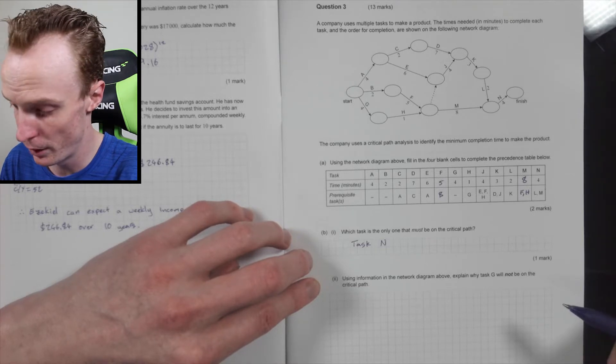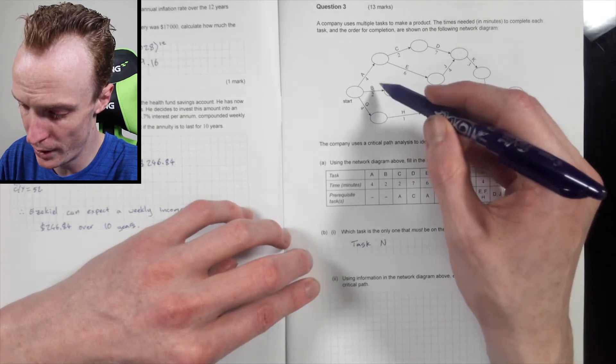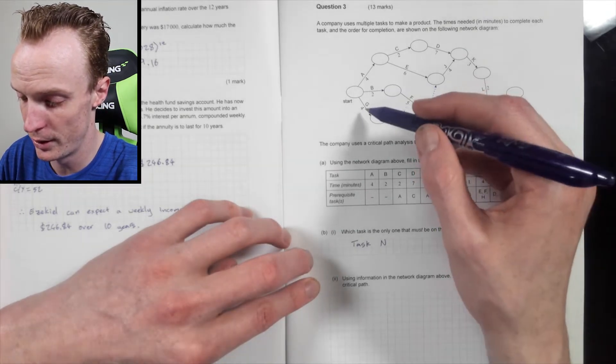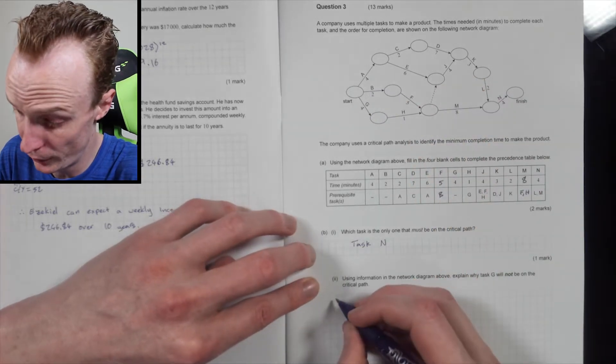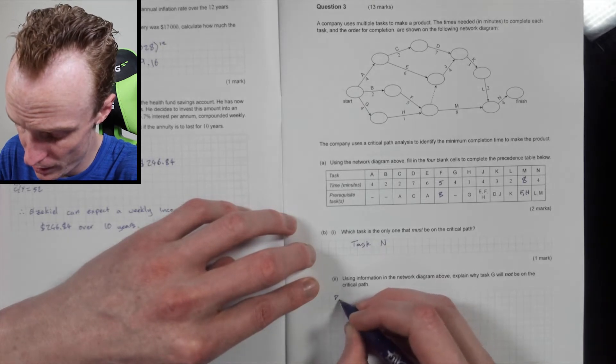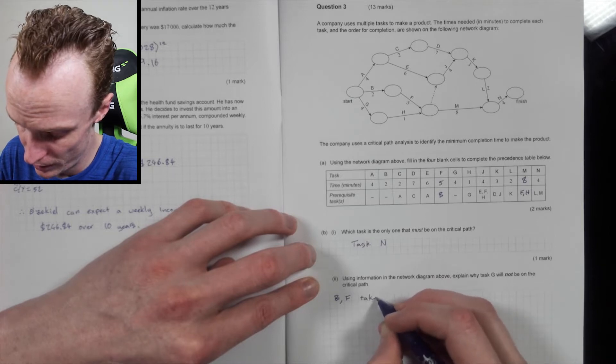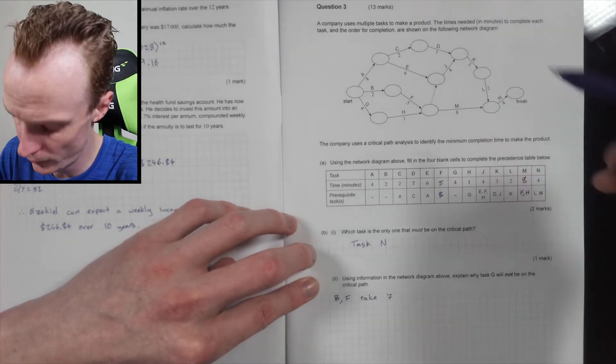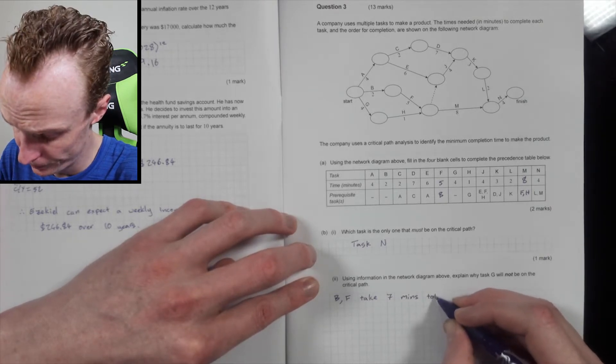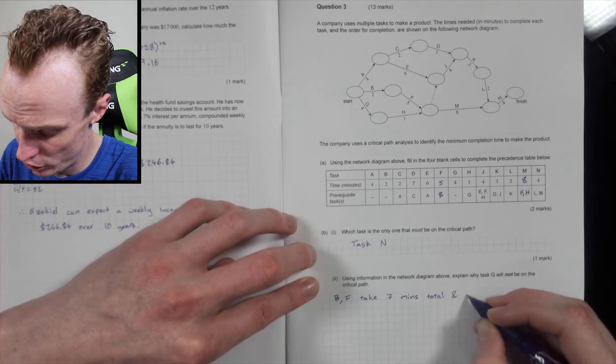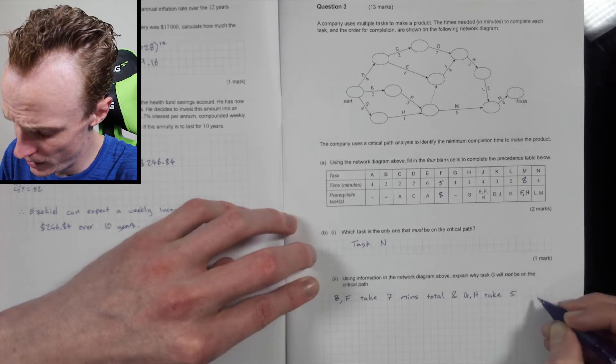Alright, so that's there and that's there. So 4 plus 1 will be 5. 2 plus 5 will be 7. So that's shorter than that, so this one's more critical than that, and that's basically what you're explaining. So B-F takes seven—what's my units here?—minutes, so mins total. And G-H takes five minutes total.